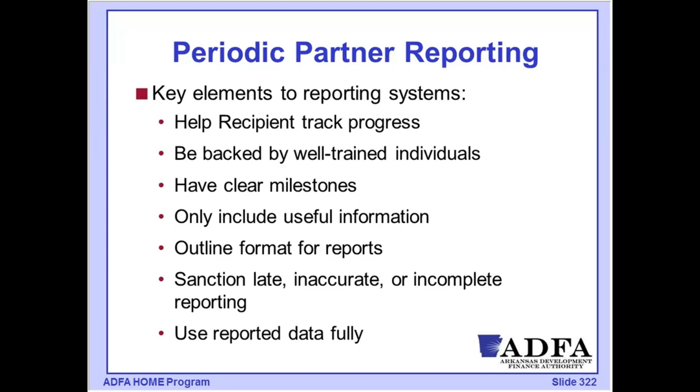As part of this, we want some periodic reporting, making sure that we're able to track the progress that each recipient is making on their projects, making sure that they are retaining well-trained individuals. The way we can do this is reporting on progress. That would include things like milestones that have been established. So if we've got a new construction project, we have a construction timeline that would be used as part of ADFA's approval, and then evaluating, reporting from that partner.